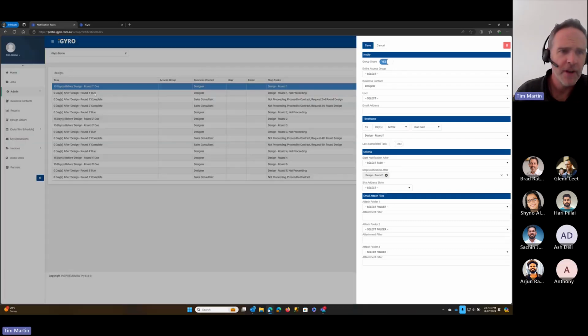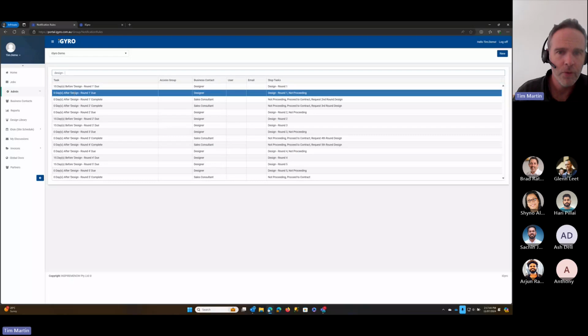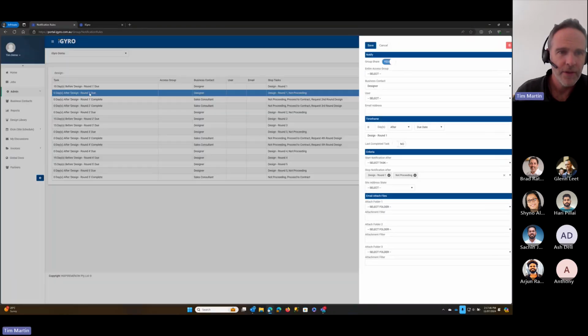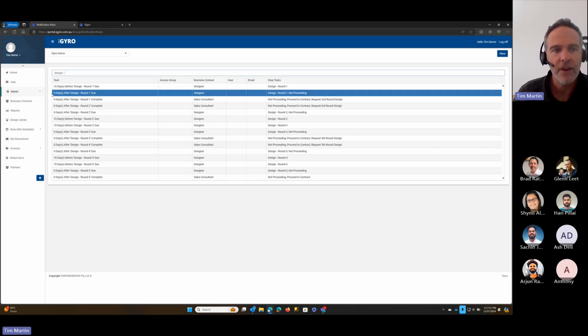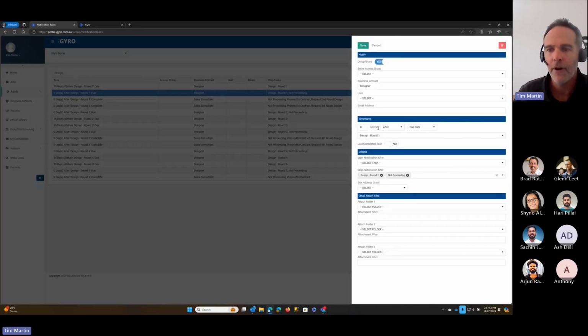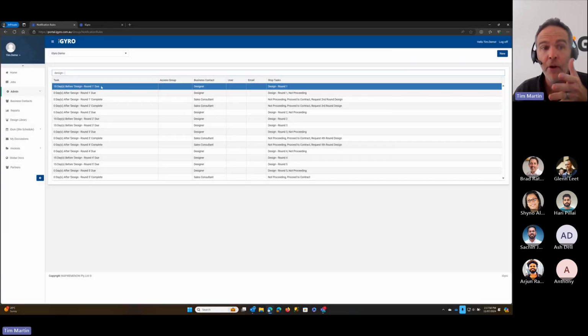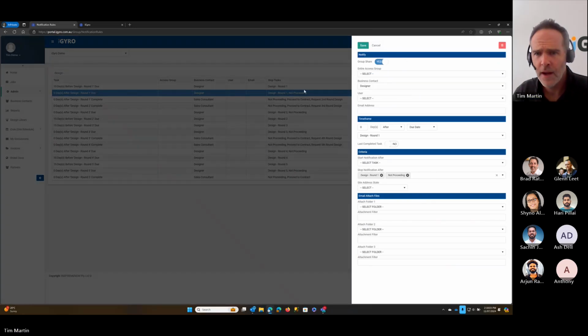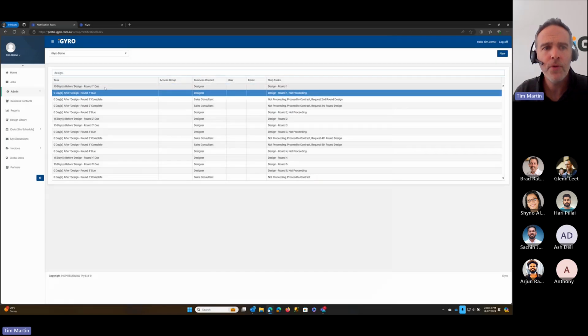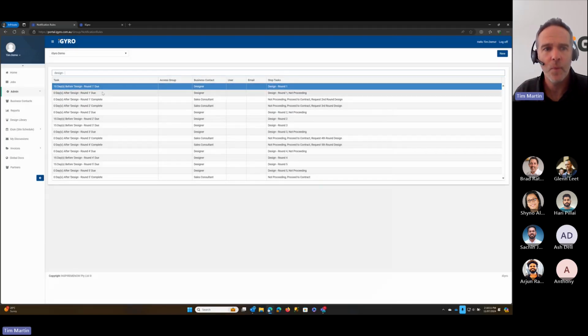Along with that one, you also need an after design round 1 due rule. So this first one is saying, let us know up until that point that it's due. This next one is saying 0 days after it's due, notify the designer. So that notification will stop on the day that this is due, and this one will kick in on that same day to take over. They will only be removed if design round 1 has occurred or the job is marked as not proceeding. So usually you would need 2 rules for each task here, one before and one after.